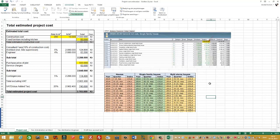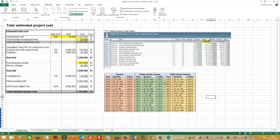Now it's your assignment to update the price from 2013 to 2014, the latest price. You can go to be on the safe side, take quarter one with the index 129.5, and then you can make the new price to the index 134. So it's your assignment to find out how much is the price increase in this period, and then recalculate the square meter price.